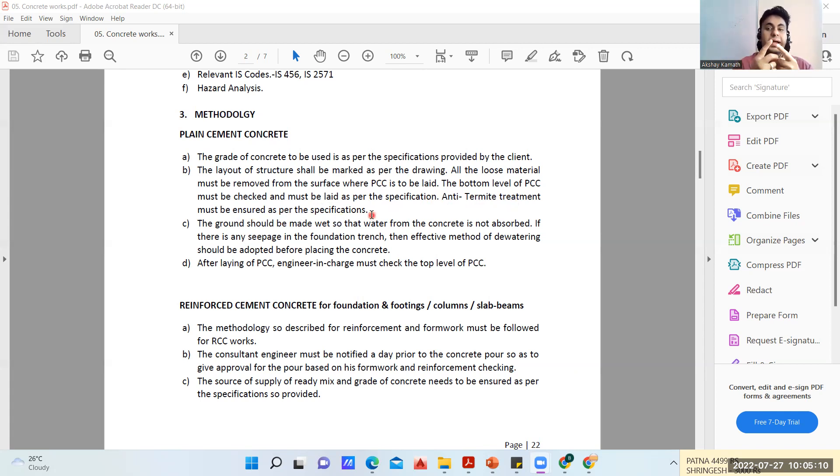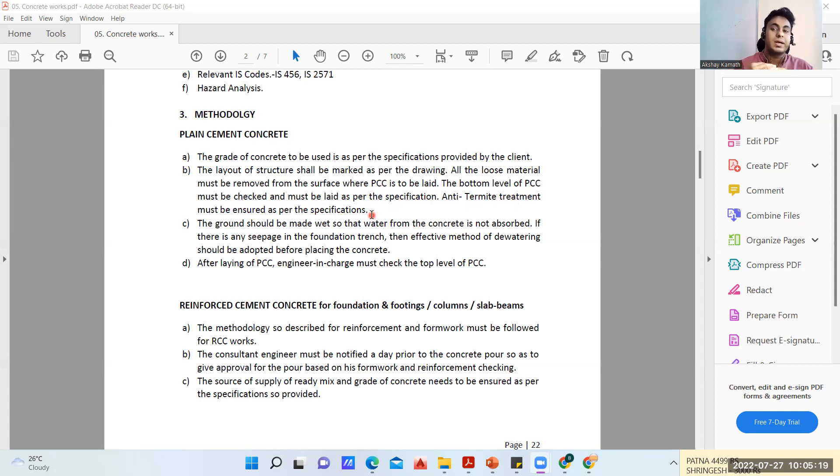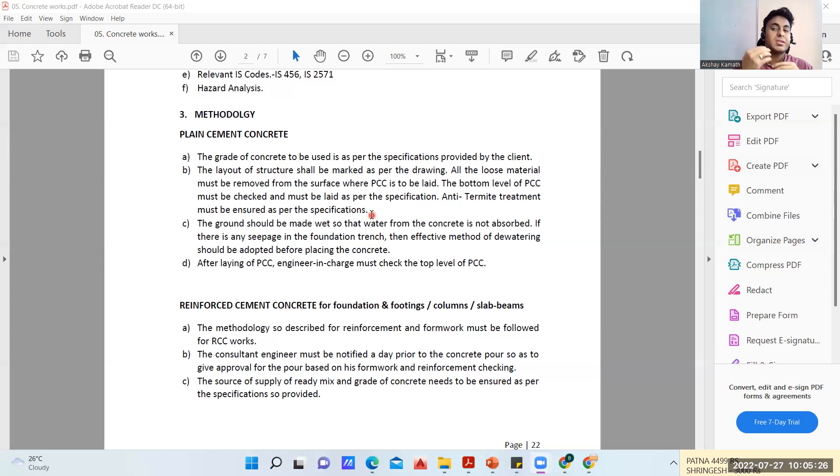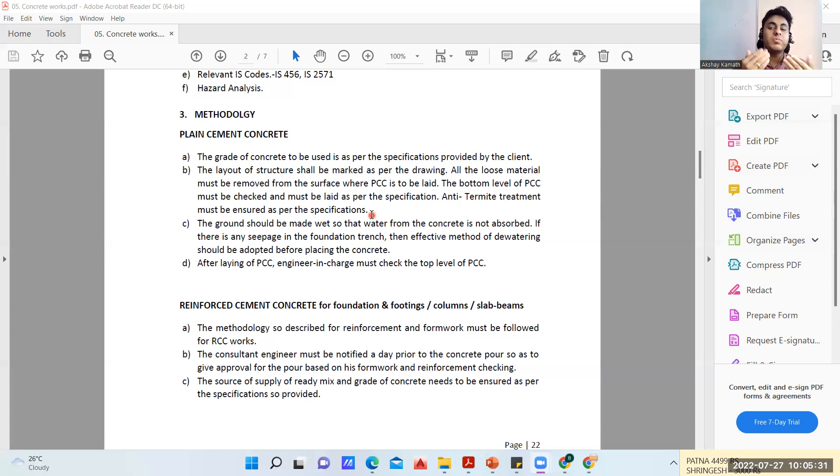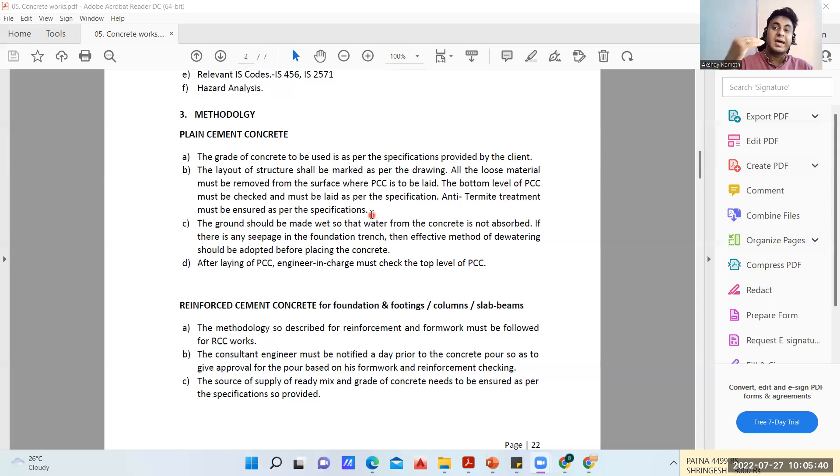Anti-termite treatment must be ensured as per the specification. As I mentioned, anti-termite treatment can be done in two ways: one is as soon as you do the excavation, or once you reach the plinth level. There are two ways of doing that. It will be written in the BOQ or the client may convey where exactly they want the anti-termite treatment. Right from the beginning is always good, that is the best way to do anti-termite treatment.